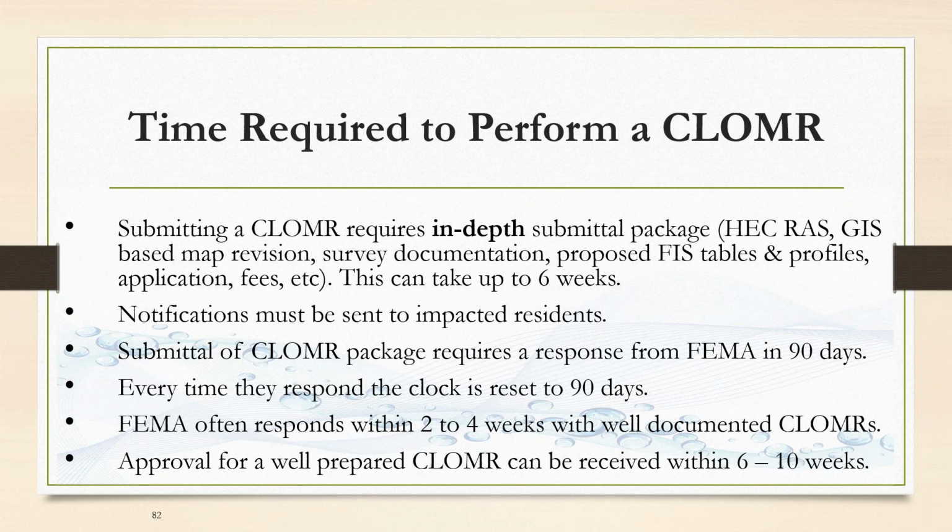Approval for a well-prepared CLOMAR can be received within 6 to 10 weeks. So you add all that up, and we tell people it can take 6 months or more to do that. We can get it done sooner, but look at the issues that can come up with respect to the timing of getting through this CLOMAR process.